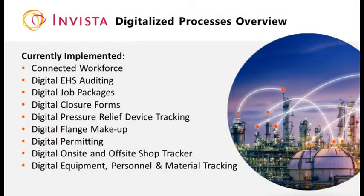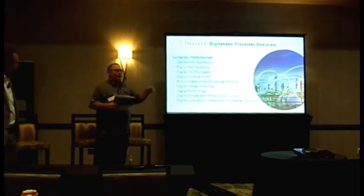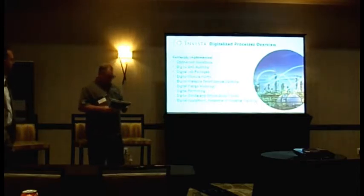The digital on-site and off-site tracker, we use another program where it's manually inputted right now, but it keeps an update on where we are, and we progress Mobideo on what percentage they are at the shop off-site, to where we know it's coming in and gives us an expected return date.